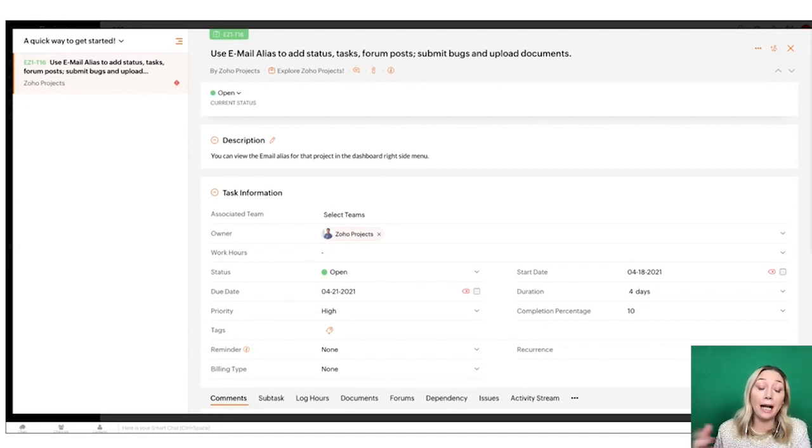Whoever's doing it, I'm estimating that it's going to take you 3 hours to complete. If you have logged 6 hours on a 3-hour task, something's going on there, right? Either I'm bad at estimating, you ran into an issue, whatever the case. This is very useful in pulling reports, especially if you work on a fixed price basis in your company. You can see whether you're actually making money on a project or losing money on a project.